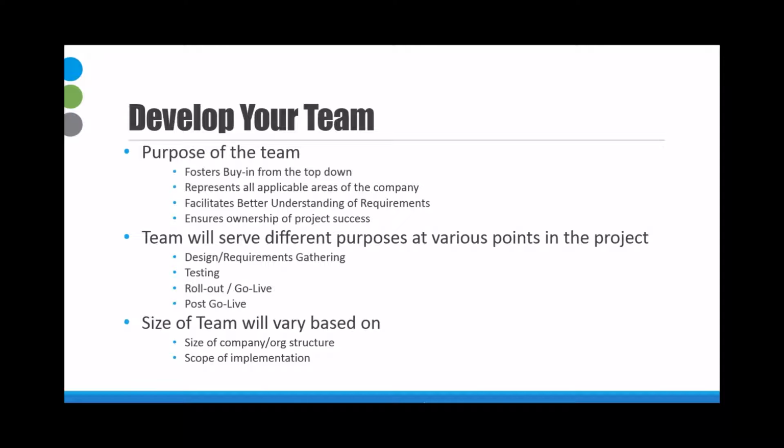And then another thing to point out is that the team will serve different purposes at various points in the project. So as you move throughout the project, requirements gathering to the testing of the functionality, actually rolling it out, and then after you've gone live, the team is going to play a different purpose. So you want to take that into account as you're picking your team. And also the size of your team is going to vary. There's no magical number as to how many people should be on a CRM project team. It really is contingent upon your company's culture, your organizational structure, and really the scope of your implementation.